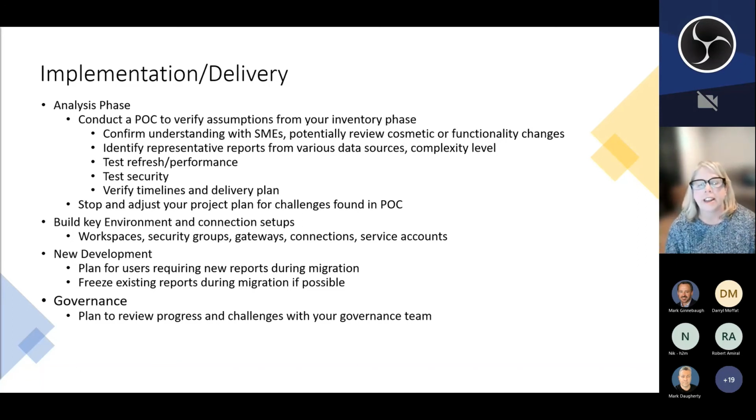So getting out ahead and getting out early on that and doing this deep dive analysis is one of the most important things I think you can do when you go to plan your migration. Testing your performance, testing your refreshes. Are they going to work? How's that going to work? And like I said, getting the right representation from each of your different sources and different complexity levels is really important.